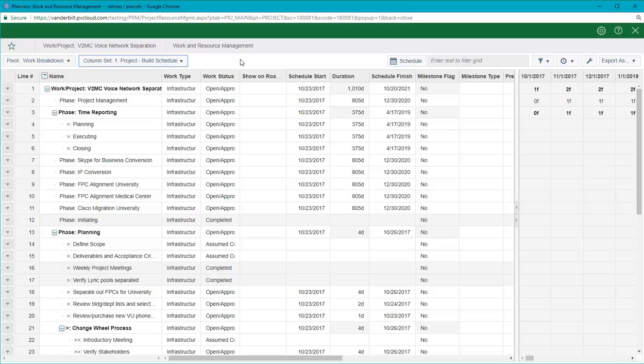The schedule is a project's plan, including phases and tasks, with information like dates, durations, resources required for the project, constraints, and milestones. A phase is a group of related tasks. It is a best practice to divide the scheduled tasks into phased sections. Phases on the schedule display detailed percent complete and effort information for that section of tasks, including variance information from the active baseline. At the completion of each phase, it is good practice to state a milestone.